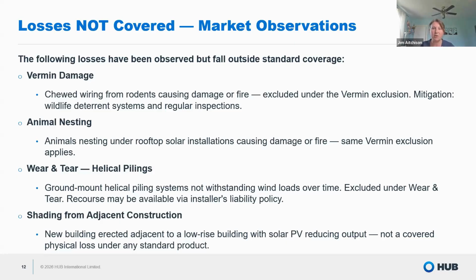Especially if you're contracted to do panel cleaning, one of the things that's come up in a handful of locations is additional costs of panel cleaning. So not just twice a year, needing it to be done 3 or 4 times a year because there's a quarry close by and there's lots of blasting and dust settling. This can also happen at certain types of farms and other very dusty places where there's excess soiling on the panels, and that's not something that's covered by insurance.